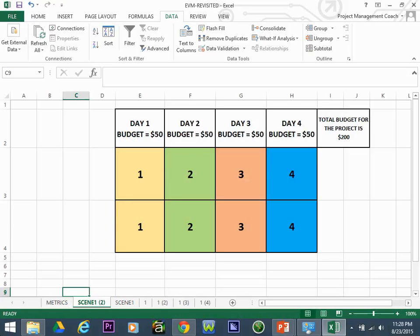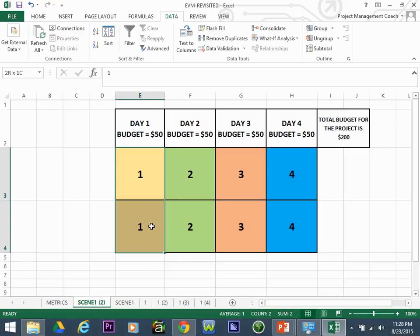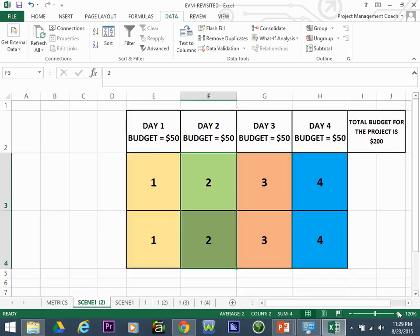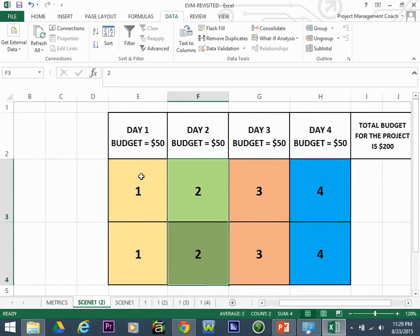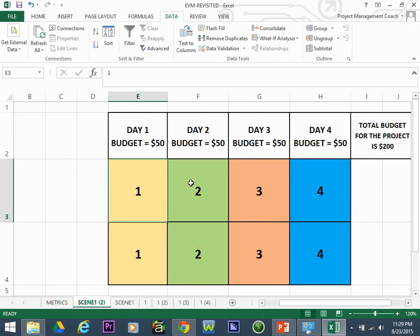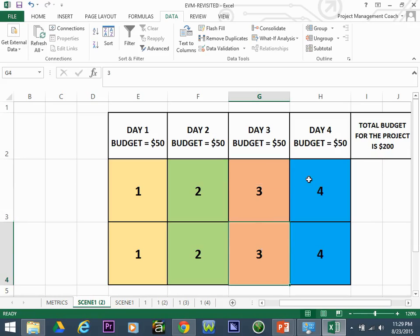To do that, we'll look at a scenario in which work needs to be done. This is a painting project. We have four panels to paint: one panel on day one, one on day two, one on day three, and one on day four. Each day is broken out into two separate discrete pieces.